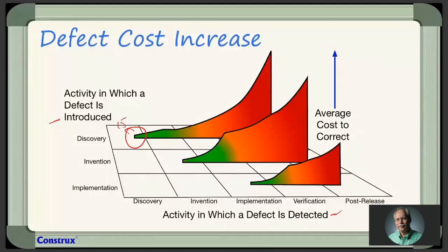But let's say it doesn't happen there. We don't see it during backlog refinement. We pull it into sprint planning, and we discover the same defect there. Well, it's not quite as fresh to the product owner, and we're in the middle of sprint planning. We may have to put it back. It may be an emergency phone call. So instead of spending 15 minutes, maybe we're spending 40 minutes of overall effort. We've increased the effort somewhat, but not a huge amount.